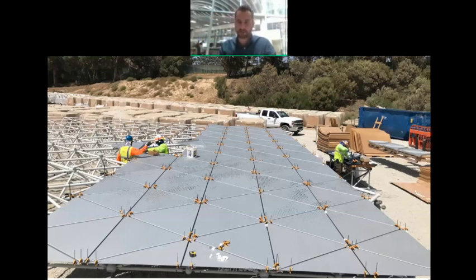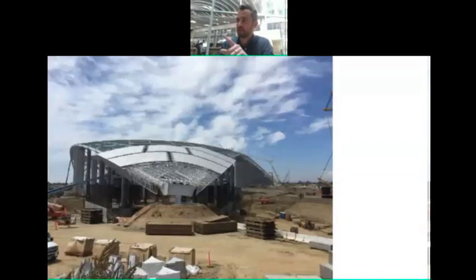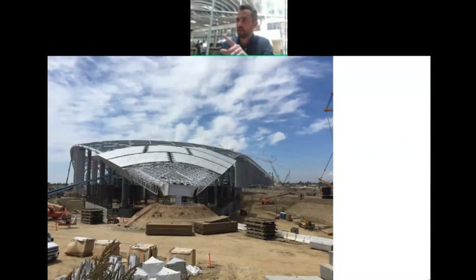to the field. And in some cases, you can see from any of these photos, there were these zipper sections, as we called them, that were the joints between the large mega panels. So they were going to have to go back anyway and install specific panels in the air. So even if some were missing, they could still lift a full mega panel and then go back and replace a specific one that was missing.